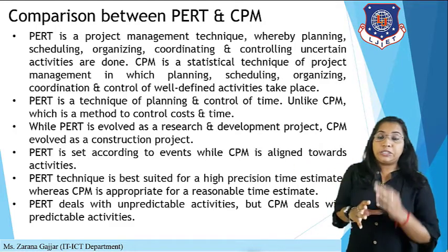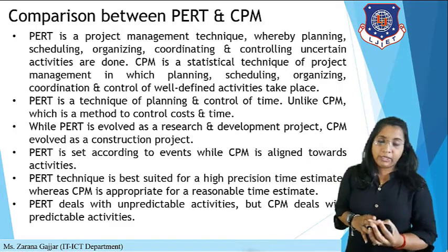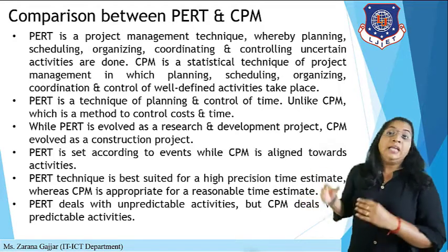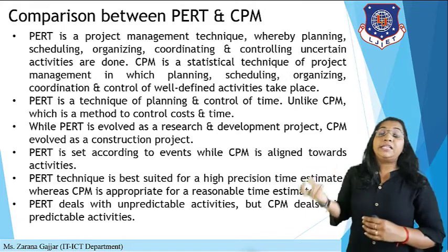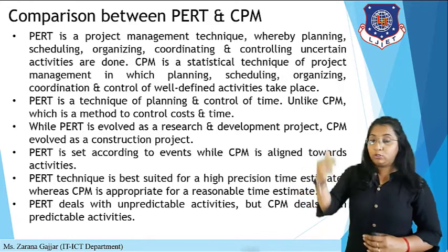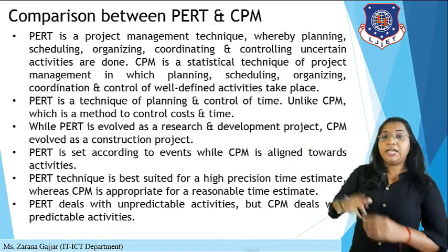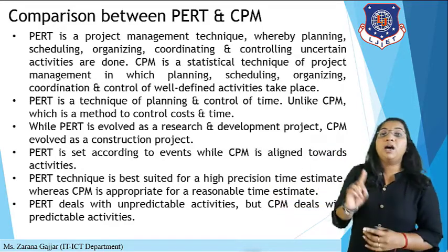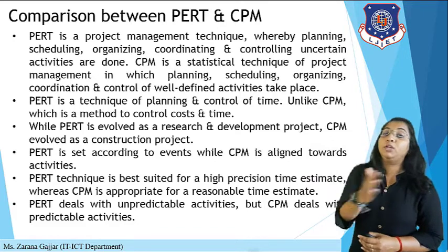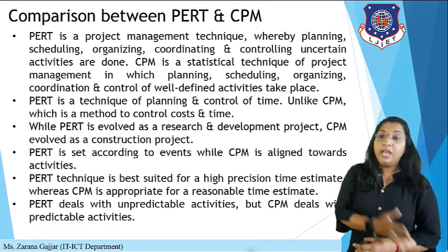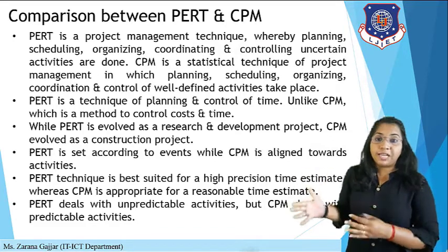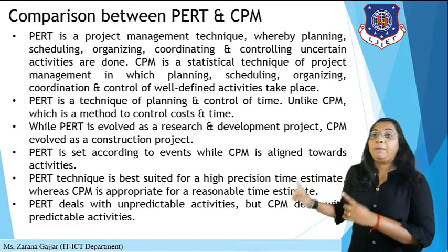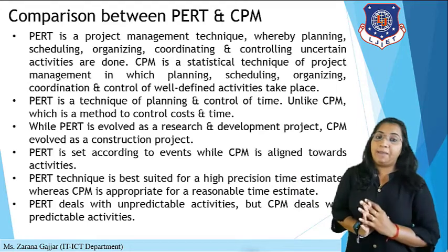But if your project is a construction of anything or an implementation, then CPM is the best method. Another difference is PERT is set according to the event. How many events there are, based on that you can schedule a PERT chart, while CPM is aligned towards activity, how many activities there are. Similarly, the PERT technique is best suited for high precision time estimates, whereas CPM is appropriate for reasonable time estimates.